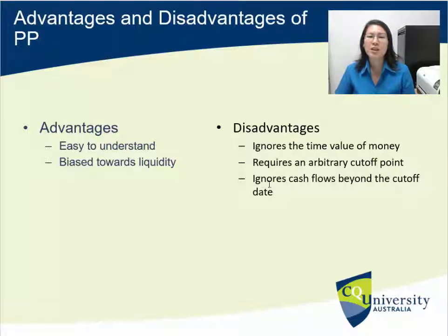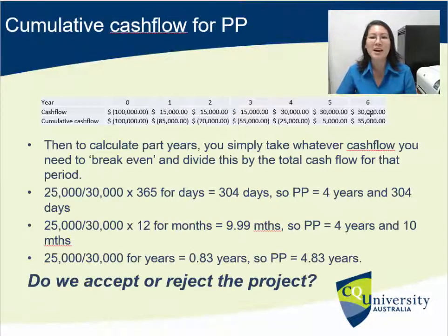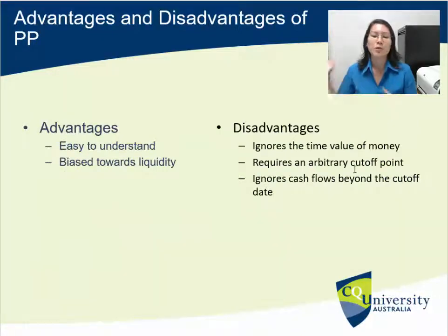And also, this is probably the hugest one, it ignores all cash flows beyond that cutoff date. So pretty much once we get paid back, we ignore the rest of the cash flows. So we've got cash flows in year 6, but for the purposes of calculating payback period, we just ignored it. We didn't think about it. And that's important because not only did we get paid back, we got paid back more. So that's one of the disadvantages. So it ignores cash flows beyond that cutoff date. So that's payback period.